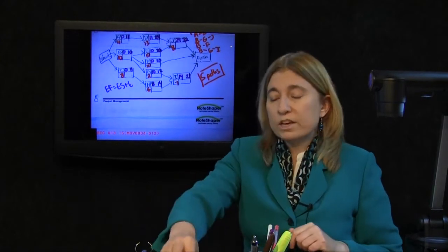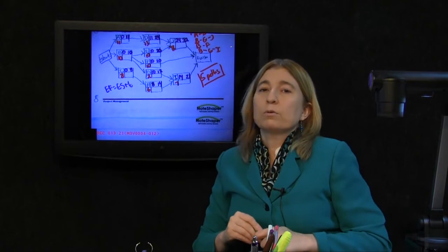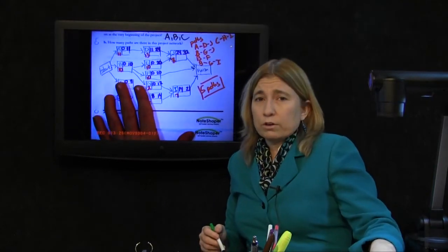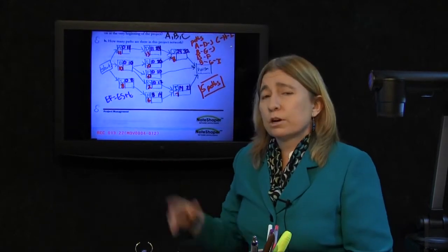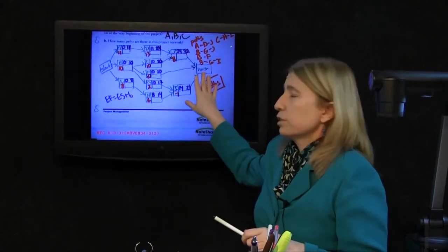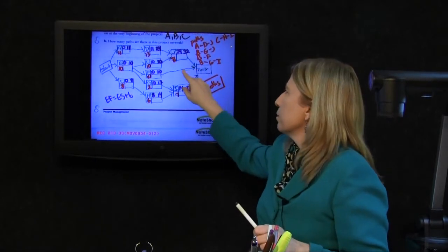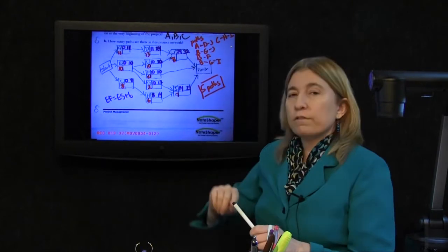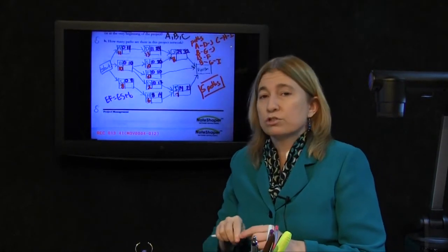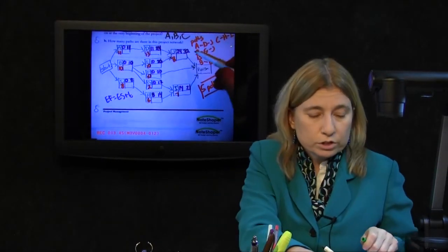Now, we have completed the early start, early finish times. And I said that'll answer that business about what is the completion time of the project. Well, it will if you know where to look for the answer. Okay, how do you determine at this point what the completion time of the project is? Go to the finishing node. Trace back and identify all of the tasks that are attached to the finish node. Look at their early finish times.